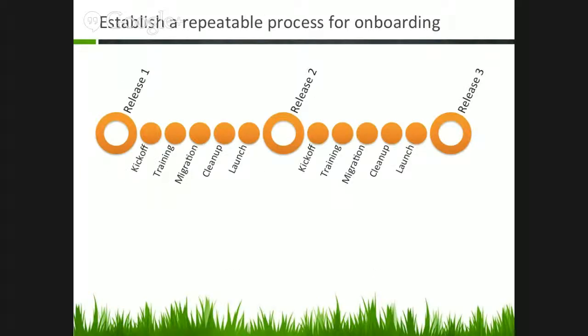And then we came up with a repeatable process, so that for each release we're doing the same things, and it's become pretty automatic now. We know what we're doing. So we start out with a kickoff meeting that we do well in advance of when the components need to be involved, so that they can set their calendars. During the kickoff meeting, we give them a migration guide that they can take back with them that explains all the steps and everything they need to know.